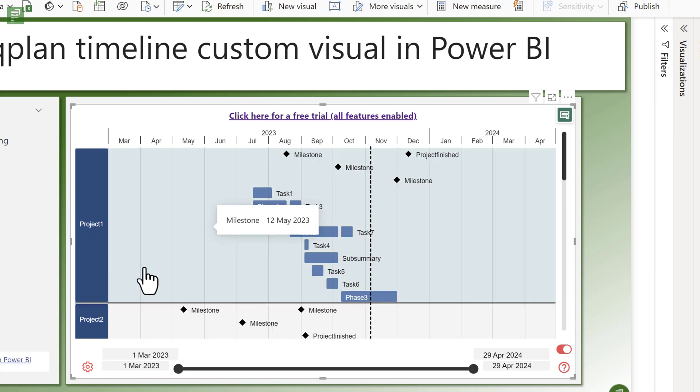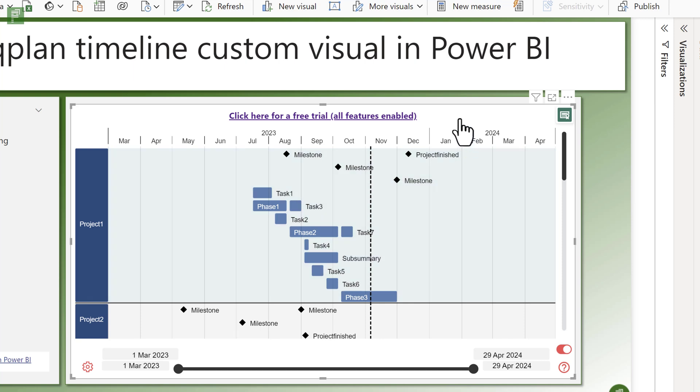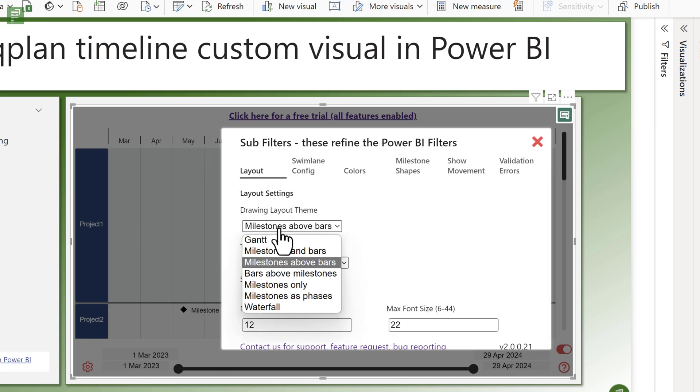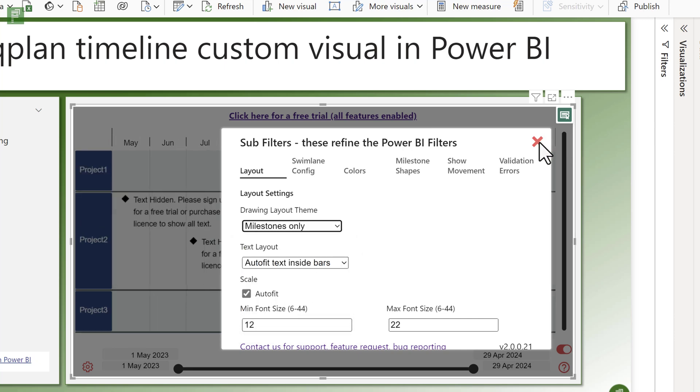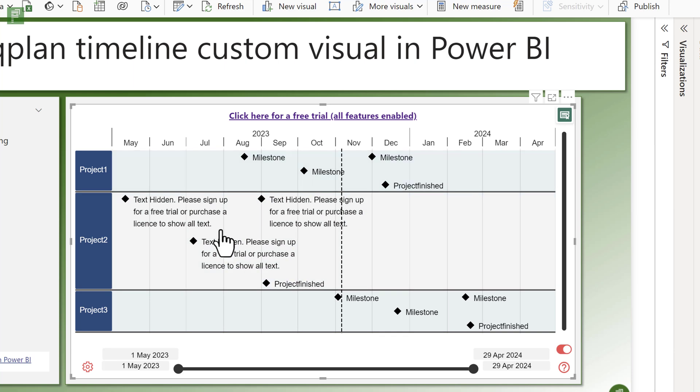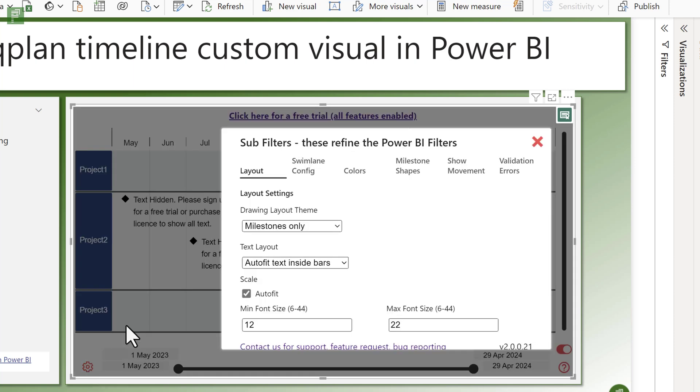With Swimming Lanes I get an introduction to the settings page of the TrackPlan Timeline. Currently I'm just using the swimming lane, and we'll come back to the swimming lane to mirror project hierarchy in just a moment. But let's have a look. Use swimming lanes by grouping data, and here we see our first project. Lovely. So let's dive into some of the specific things that I like about the TrackPlan Timeline. One of them is already on screen where I have the milestones on top of the project. That's lovely, right? And I can even choose, going by the settings, going to the layout, I can even choose to only show milestones. Which is of course also a very powerful way of visualizing your data.